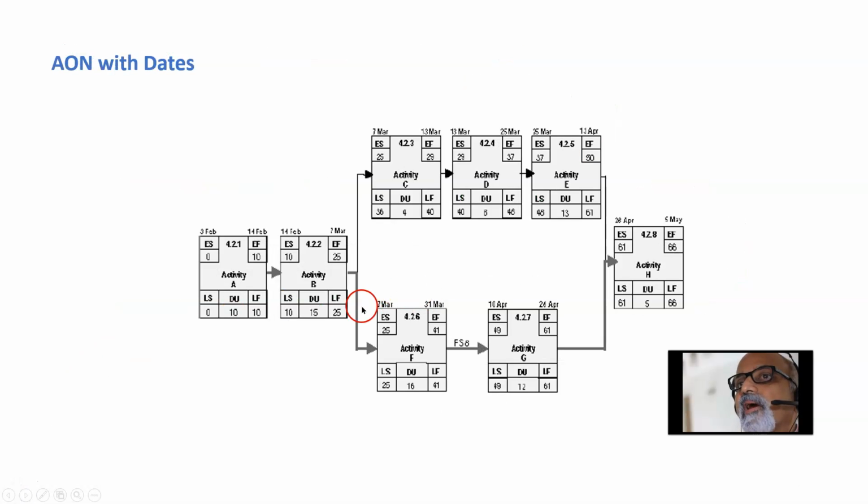Now once we have a diagram like this, in scheduling packages, if you give the start date, it will look at the company calendar defined and block off all the holidays and stuff like that. So it will refer to the organization's calendar, and if I give a start date, the tool will automatically work out the end dates and give me those dates.